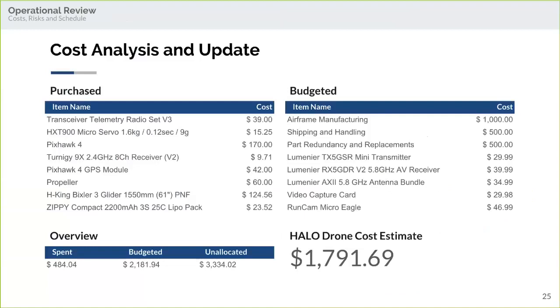So for our current budget, we're planning on $2,100 to make our entire aircraft. Accounting for some other spare parts, we still have about $3,000 unallocated. This means any financial overruns are likely to be safe, and we don't need to worry too much about overrunning our budget, and have the possibility of either making a secondary aircraft if we have revisions late into the process and/or other problems that will arise.